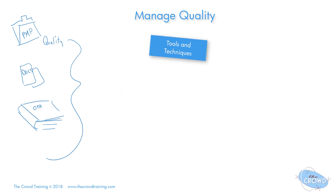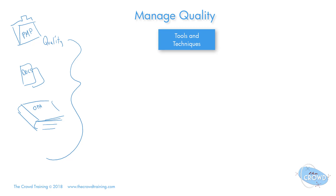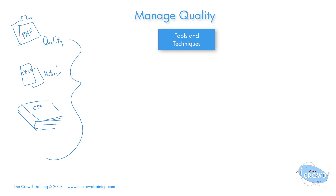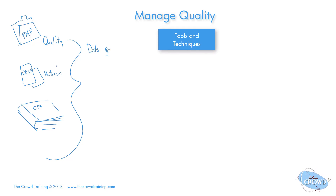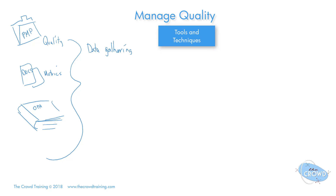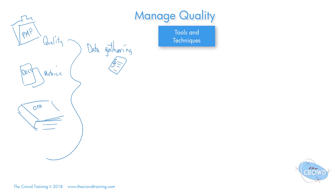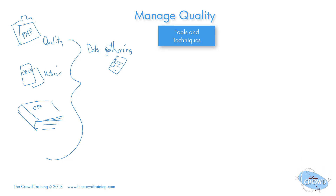There are many tools and techniques, so let's go through each one individually. When we're managing quality and we have these plans and metrics that we've set out, we should have the ability to gather the data accordingly. The techniques in which we do that could be checklists, check sheets, or marks — however we're using to get the data on whether or not we are in fact meeting the quality standards set for this project.